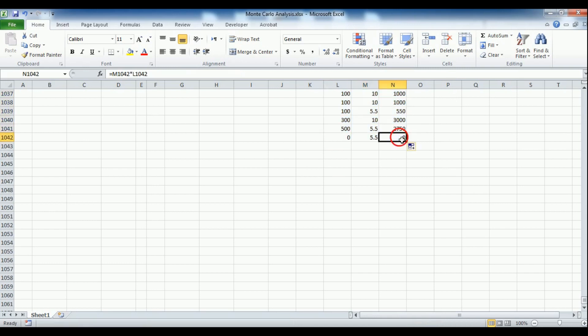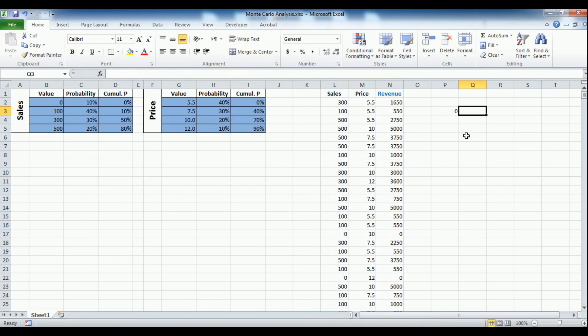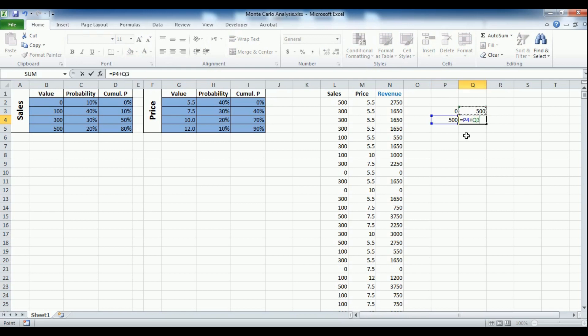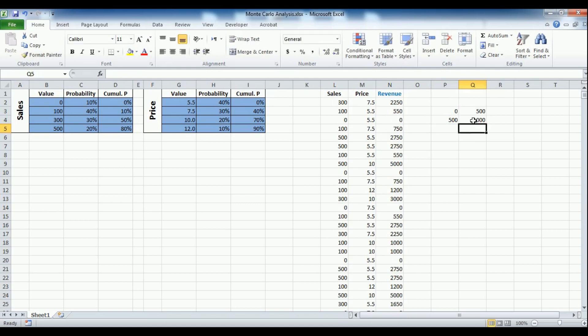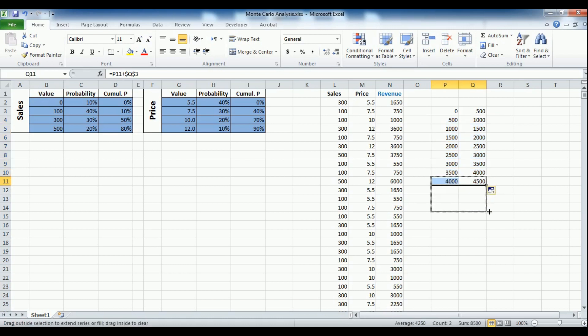What we're gonna do now is count the frequency of the different resulting values of revenue. We will count these values into a set of value ranges, called buckets. These value buckets cover the whole range of possible revenue values. This allows us to observe which values occurred more frequently in our simulation.